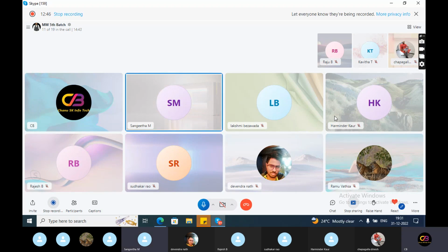Next comes the explore phase. User participation will be there, and they will test in the Sandbox environment. In this phase, the SAP consultant will demonstrate the predefined configuration kit, that is, ready-made templates, and we will gather the information to identify the gaps and close them quickly based on the business requirements. We will have to do the fit-gap analysis, that is, the ready-made SAP and the client solution need to be analyzed and identified.